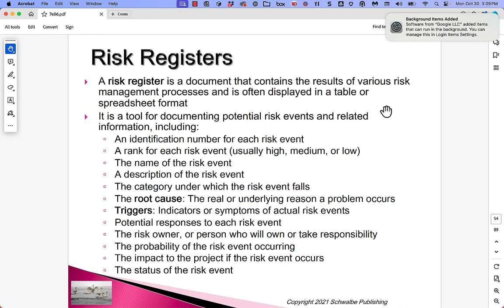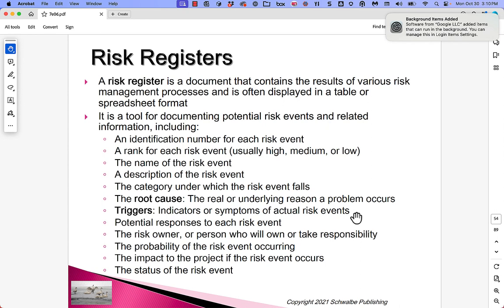Going back to the slide: we have an ID number, a rank — usually high, medium, or low — the name of the risk event, a description, a category, the root cause (the real or underlying reason a problem occurs), the triggers (indicators or symptoms of actual risk events, telling us whether a risk has come to pass), potential responses for each risk event, the risk owner (the person who takes responsibility), the probability it will occur, the impact if it does, and its current status. This can drive a lot of good thinking and talking on a project.